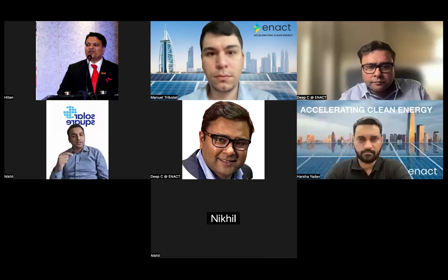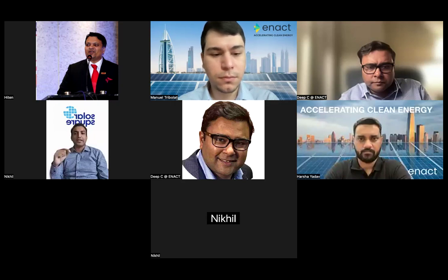The first survey we call a field-level survey, because that's the kind of accuracy we can achieve with a virtual kind of setup. Once the initial assessment is done and the technical feasibility of the site is confirmed, when the sale has actually happened, we conduct another survey, which is an install-level survey. There, more minute details at the site level are observed. And any deviations from the original design done at the pre-sale stage get confirmed at the post-sale survey.